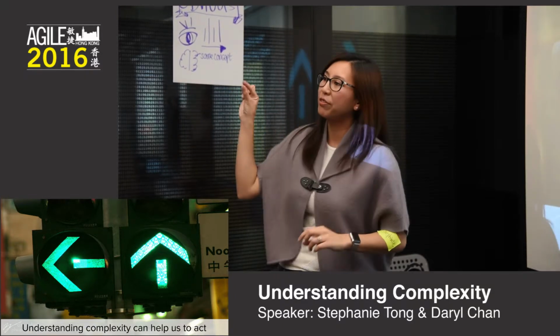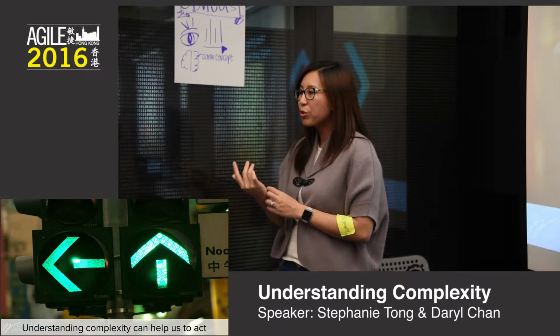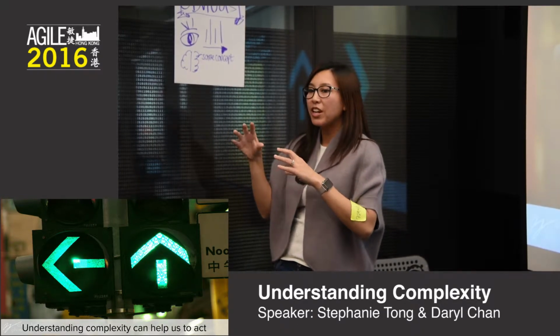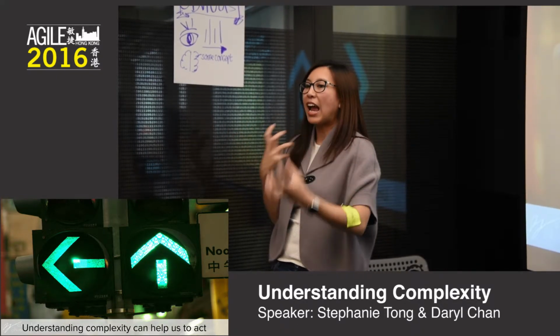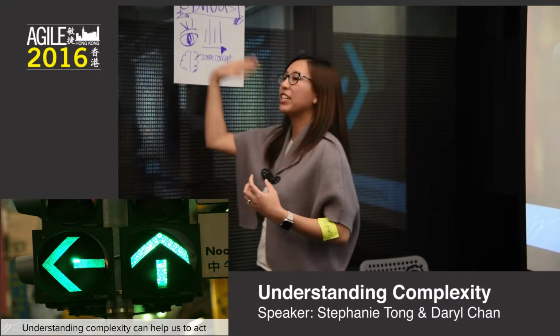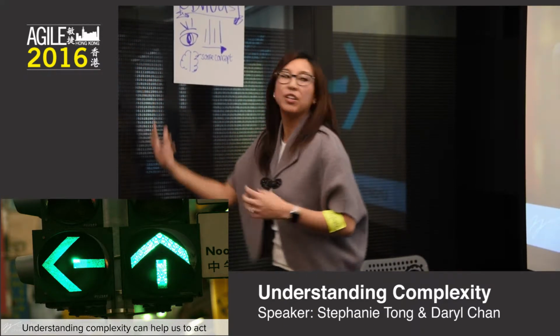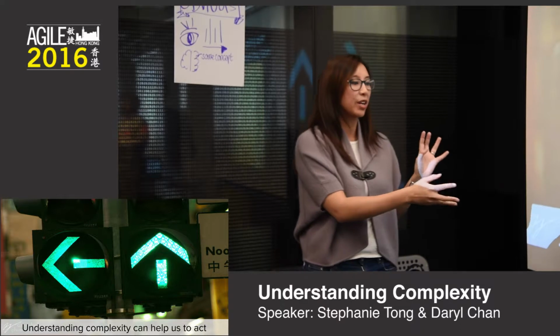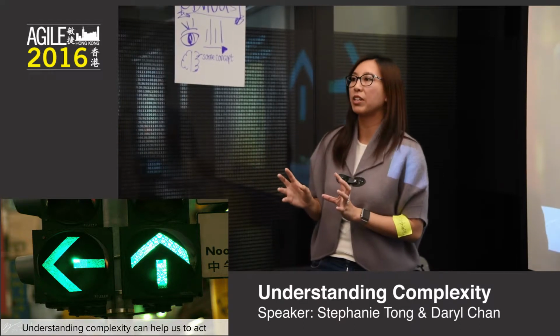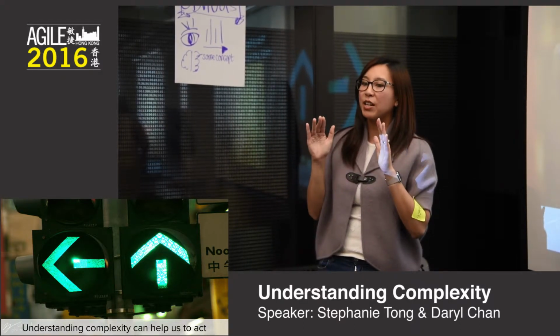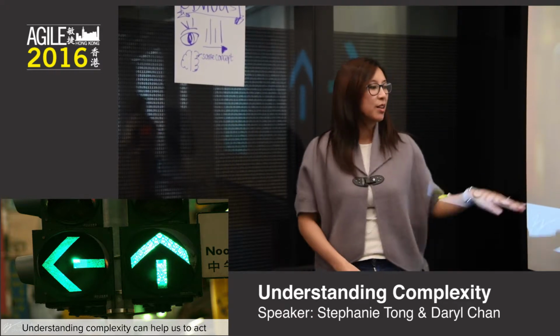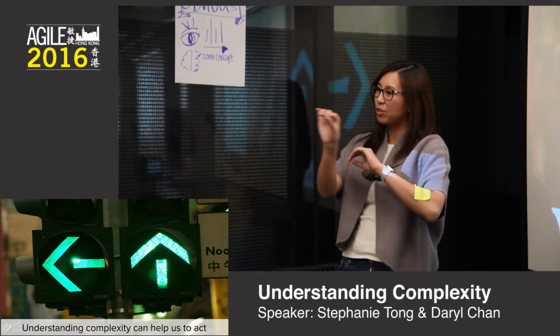So we choose a very thin layer to try to prove that by sprint 2, and that's how we attack what we already know is a complicated problem. So this is an example of how we understand, okay, this is a really complicated problem, let's focus on it, but not panic about it, and it helps us to act accordingly.